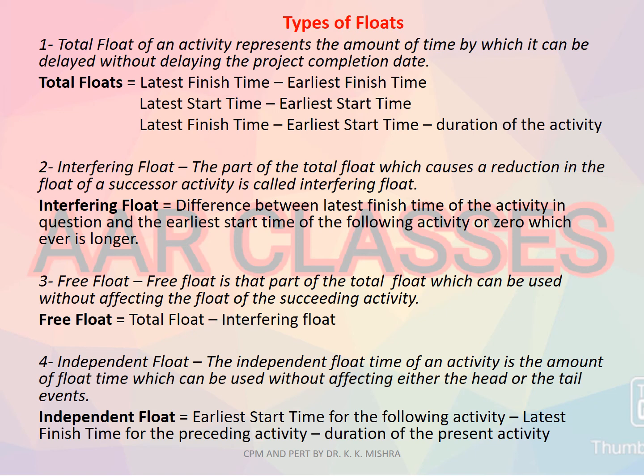Fourth, independent float. The independent float of an activity is the amount of float time which can be used without affecting either the head or the tail events. Independent float is equal to the earliest start time for the following activity minus the latest finish time of the preceding activity minus the duration of the present activity.